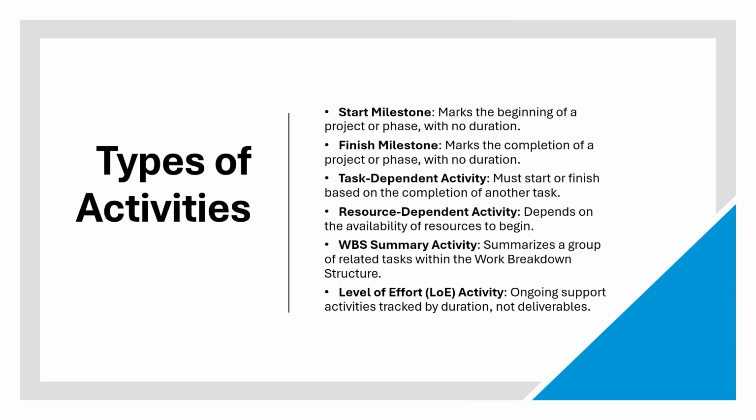Then we have task dependent activity. Task dependent activity means that this activity is dependent on a task. For example, curing of concrete. When you are doing concreting, you cannot remove shuttering before 14 days. So it is dependent on a task.